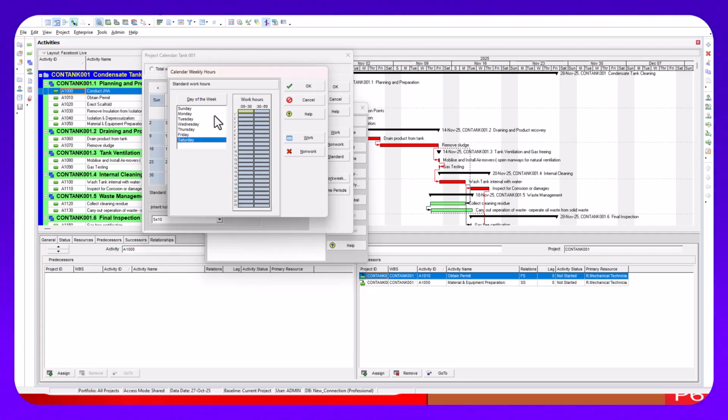Now, this is where it becomes interesting. You need to be very detailed. So in this case, we are assuming standard working time, even if it's on Saturday, we're still working a normal 8 hours, with 1 hour break, right? So our assumption is that we are starting this work by 8 o'clock, 8 a.m. So from 8 to 9 to 10. Each of the boxes represents 30 minutes, right? To 11 and to 12. So at 12 our lunchtime starts.